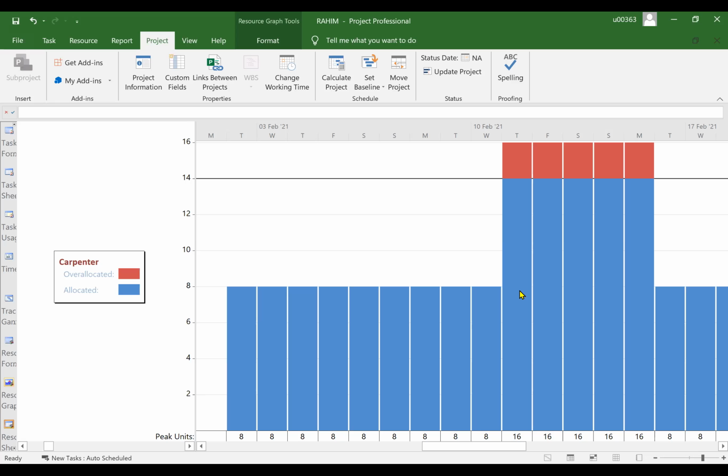And then what shall we do? That is the issue. The simplest way out is basically to add more resources. But adding more resources could mean extra costs. That will be another issue. If we do not want to do that, instead of overlapping those activities, can we do something? Let's say we do not want to add resources. We just want to adjust these two activities because we know the overlapping is the issue. Why don't we just simply adjust?